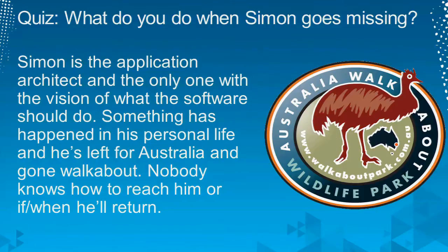You should make sure that A, everyone on the team has access to the vision and shares in the vision, and B, if that person really is the product owner, get them off the team. They shouldn't be doing prioritization of work as well as deciding how it should be built. When the person who decides the what and the person who decides the how are the same person, that's often a recipe for disaster. So that's a dysfunction as well.